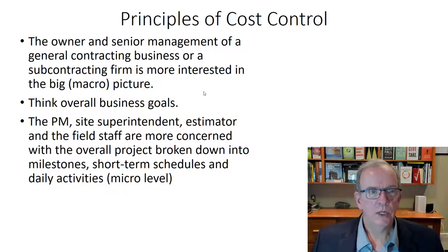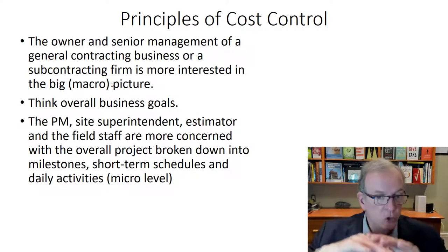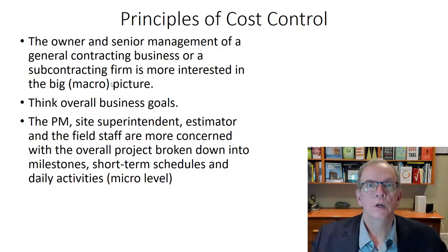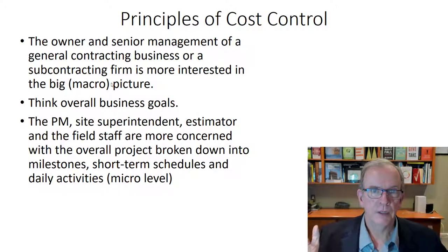And we have to think, how are we doing at a high level? Are we meeting our project targets? And so the project targets, going back to what we just said, you have the overall cost structure for the project, what you're trying to achieve, and that's ensuring that you cover the overhead, you cover the profit margin you want, and you've made sure that you're able to build it for the budget amount that you've estimated, right? And if you don't, then the first thing that gets wiped away is your profit. So anything that costs more in your direct costs takes away from your profit. Your overhead you're stuck with.